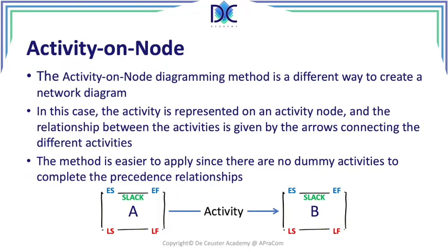predecessor-successor relationship. It's easier to build, easier to draw, has advantages, also has disadvantages, and whatever method you use, basically all methods are okay. The only thing is the activity on node, the precedence diagramming method, is the main method promoted by the Project Management Institute.